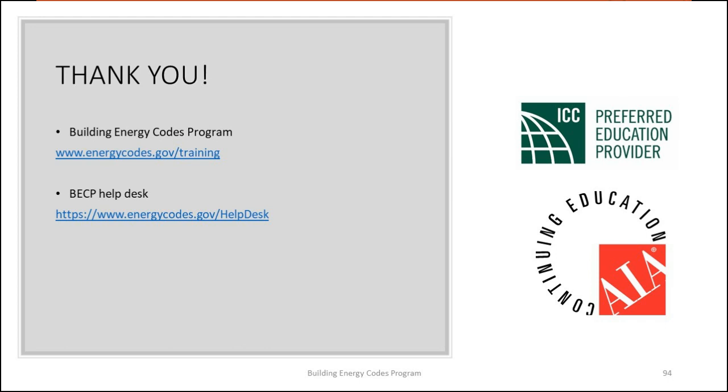On commissioning the envelope, there was a question about whether there are changes in those requirements. The actual requirements have stayed the same. You either have to do an on-site verification that everything's going together correctly in the field when the envelope is accessible for inspection, or you have to do a whole building test, as Len talked about, based on air pressure in the building. So there's not really a change in the requirement. The only difference is that it is structured. I would point out one difference in envelope is they do require third-party independent inspection, whereas for many of the other simple things, you could have someone in the firm. So a design build contractor could have a separate testing person in their firm who's not involved in the installation or the design. And I think that's it for commissioning.